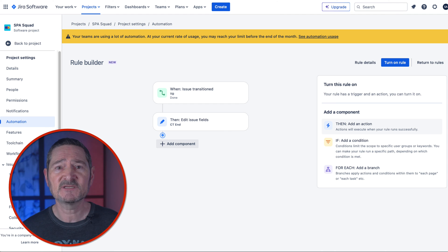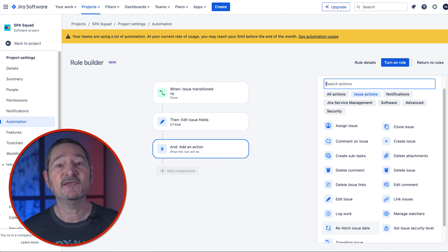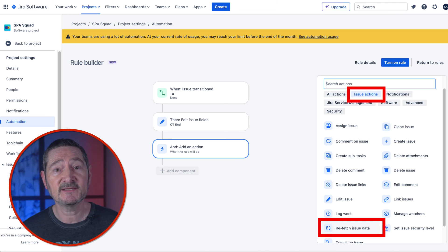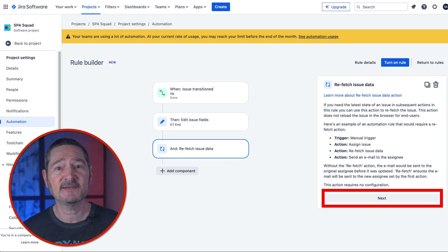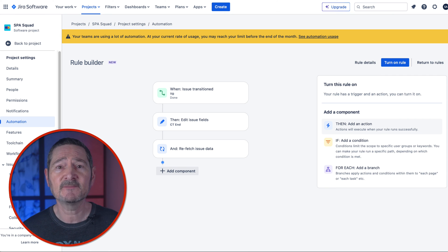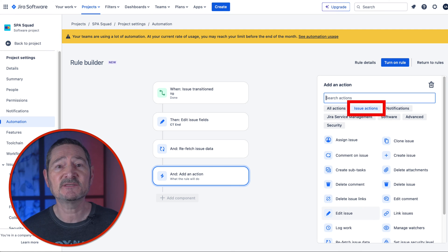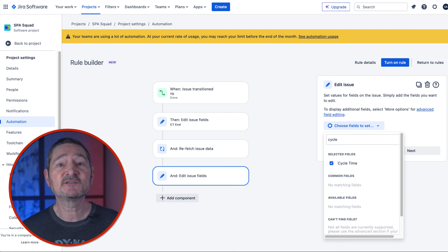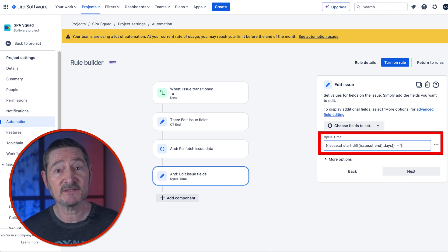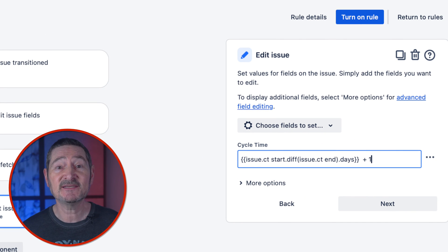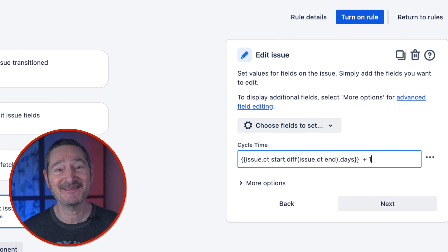Now we're going to select another Then action. Click Then Add an Action, then click Issue Actions, then click Refetch Issue Data, then click Next. We're doing this because we're about to add the cycle time calculation and we want to be sure that the date CT End has actually been populated. Now we're going to add a final Then action. Click Then Add an Action, then click Issue Actions, then click Edit Issue. In the Choose Fields to Set box, select our custom field Cycle Time. Once selected, in the box labeled Cycle Time type: `{{issue.ctStart.diff(issue.ctEnd).days}} + 1`. This takes the difference between our start and end dates and adds one day.